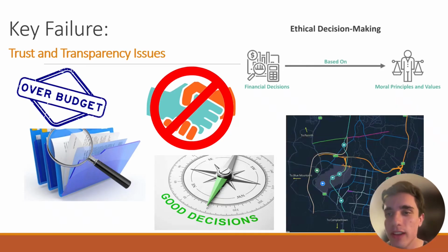The ANAO found that the WSA Code was slow to develop its procurement framework, with significant procurement activity occurring before the framework was in place. It also found mixed compliance in 2017 and 2018, including inadequate record keeping, although the WSA later improved its framework. The key lesson is that stakeholder management is not only about town halls and information sessions, it also depends on governance, ethical decision making, record keeping and transparent reporting.